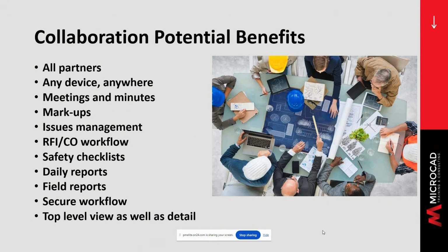Tools include keeping track of correspondence, meetings, attendees, decisions made, and action item assignments. Drawings and models need to be backed up with suggestions or changes. Questions or concerns from the project partners can be entered as issues and assigned for resolution. The PM is presented daily with the open issues so nothing gets overlooked. The RFI workflow is defined and secure. If the RFI results in a change order, the appropriate changes are made to the costing and scheduling.